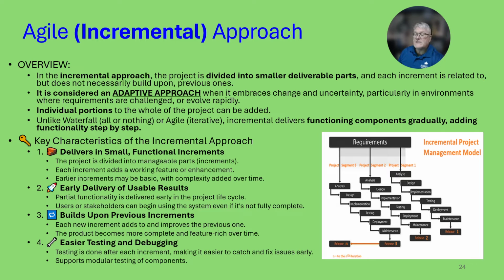Here's some characteristics of the incremental approach. Delivers in small functional increments. The project is divided into manageable parts, which are increments. Each increment adds a working feature or an enhancement. Earlier increments may be basic, with complex ones to follow. It has early delivery of usable results, so partial functionality is delivered early in the project's life cycle.